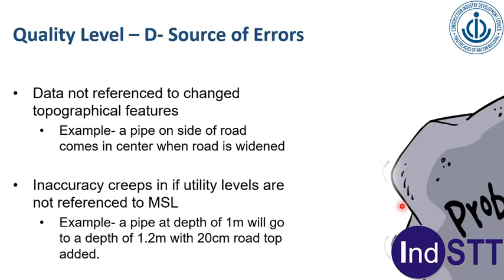Slight adjustments in the design can produce substantial cost saving and increase safety by eliminating utility relocation and moving excavation work away from existing utilities. So this is where the major improvement comes in the entire process of detection and mapping of underground utilities. Now there are most commonly used tools.